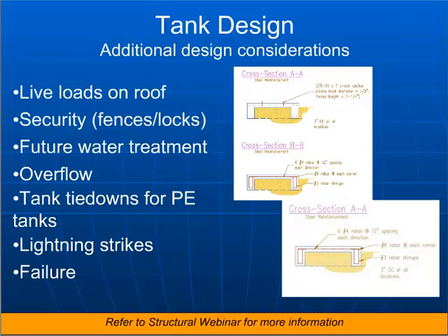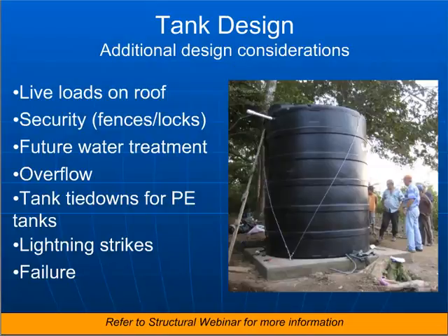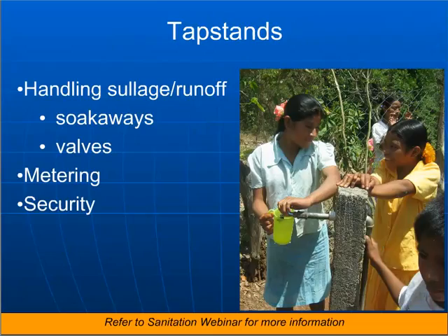And then from there, moving into reinforcement plans. So again, being very clear and very specific about how much reinforcement needs to go into these foundations, before they're actually poured, either the foundation or the walls or the roof. Here's another drawing that just shows the final reinforcing details of the tank.